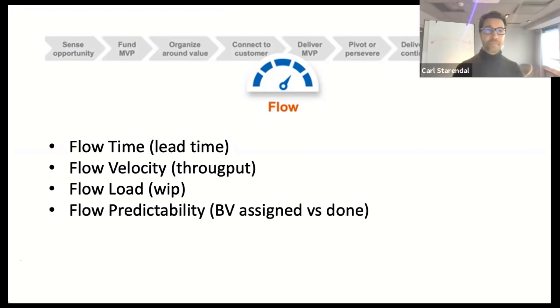They might often be, of course, but in the end, several features might come together to a business outcome somewhere. So I'm also looking for a predictability measure. And here I would use the business value that we use in SAFe, looking at the business outcomes that the teams and business define, the PI objectives, looking at the outcome of those at the end of the PI. Have we been able to close?